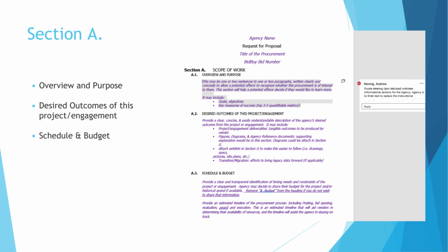For example, if the agency needs a system up and running by January 1st of 2025, and they plan on signing the contract by January 1st of 2024, then an offerer understands they would have about 1 year to get a system up and running. If the agency needs services to start January 1st, 2025, but the solicitation isn't published until July 1st of 2024, the vendor may not have the time or staffing to complete the project within that requirement.